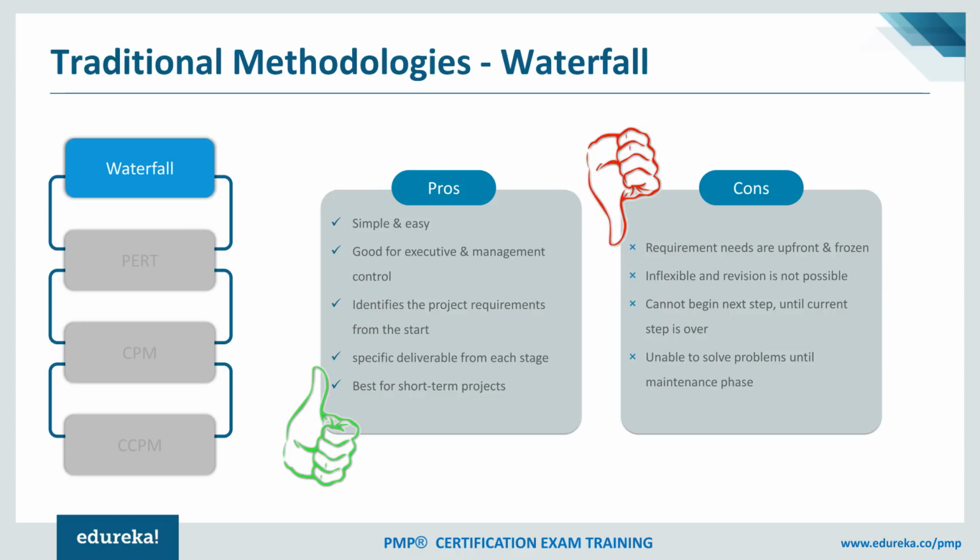A few cons could be that requirements are upfront and frozen. Once the requirements are frozen, obviously there wasn't much flexibility in terms of adding any new requirement once the requirement phase is done and you move into design. And if you identify defects or any change during the verification stage, it was really difficult to come back all the way to design, make changes, and then make changes in the build as well.